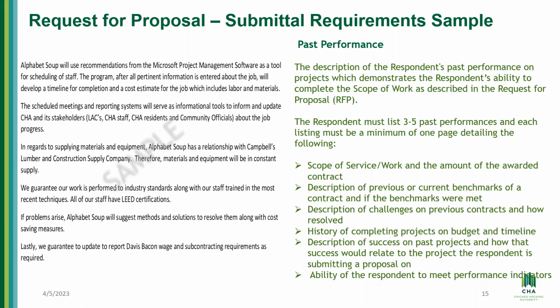Those projects have to be similar to the actual projects. For example, if you worked for CHA in the past, but that project was in carpentry, and this RFP, or the service that CHA is requesting, is for construction, then it doesn't count as a project because it's not the same nature as this project. So make sure the projects they ask you to include as a reference or as past performance are similar to this project.